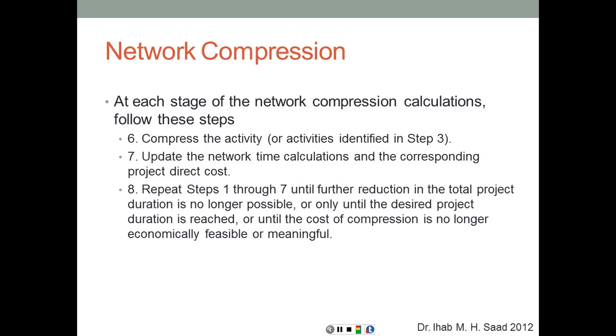Or until the cost of compression is no longer economically feasible or meaningful. So if the question is to compress the project duration until I reach that lowest point on the total cost curve, beyond that, compressing the duration is going to result in another increase in cost. I don't want that. So I just want to reach the lowest cost point, which is going to be called my optimum duration.